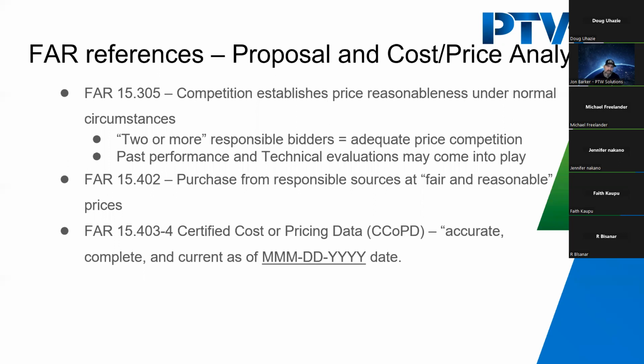I think something about 2.5 million, I want to say. And again, it's basically putting someone like a CFO, a financial officer, to certify that the prices that are being proposed are accurate, complete, and current as of whatever date.